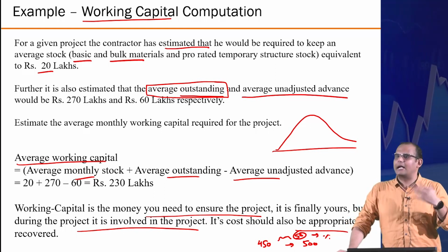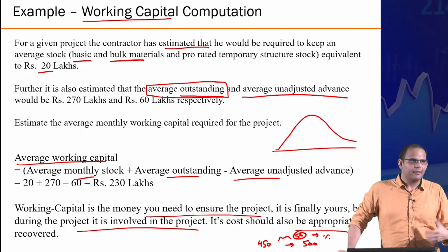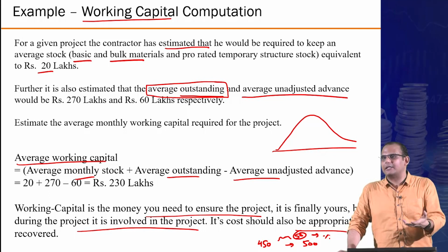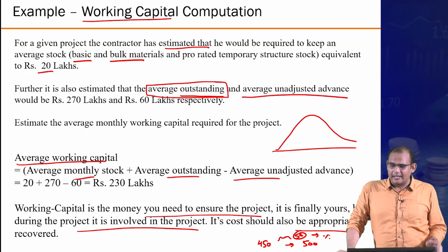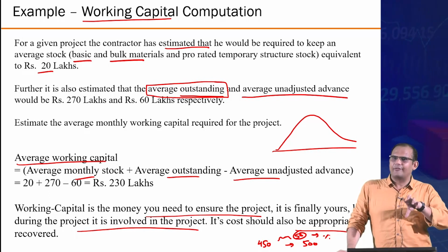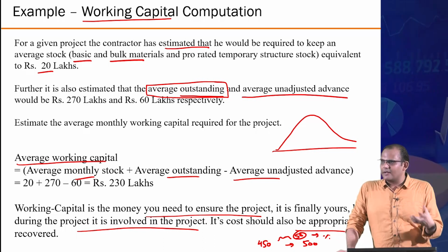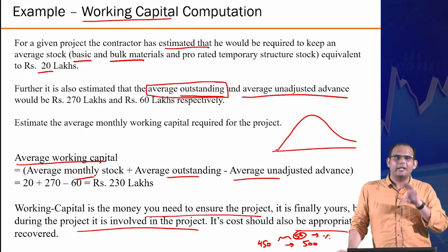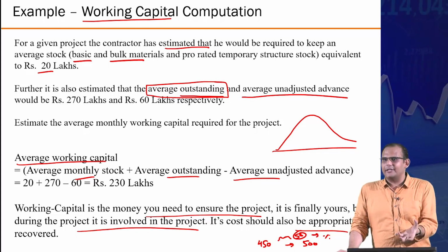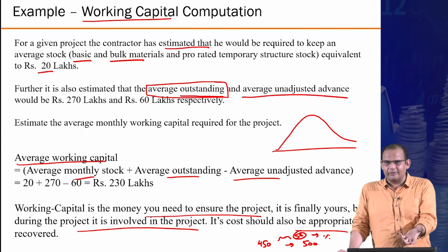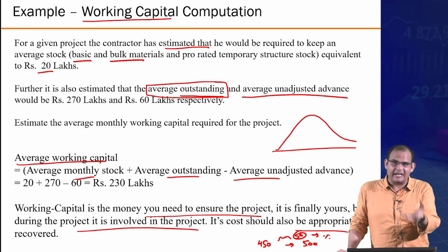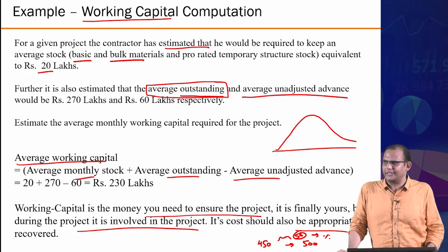Not anyone can start a construction business immediately, because you need to have this much money even to get a project. And as I was mentioning, a lot of clients ask for your financial performance. The reason is not that they care about your profitability. The only concern of the client is whether you are able to meet the working capital requirement of the project and guarantee that the project will actually go smoothly, right?